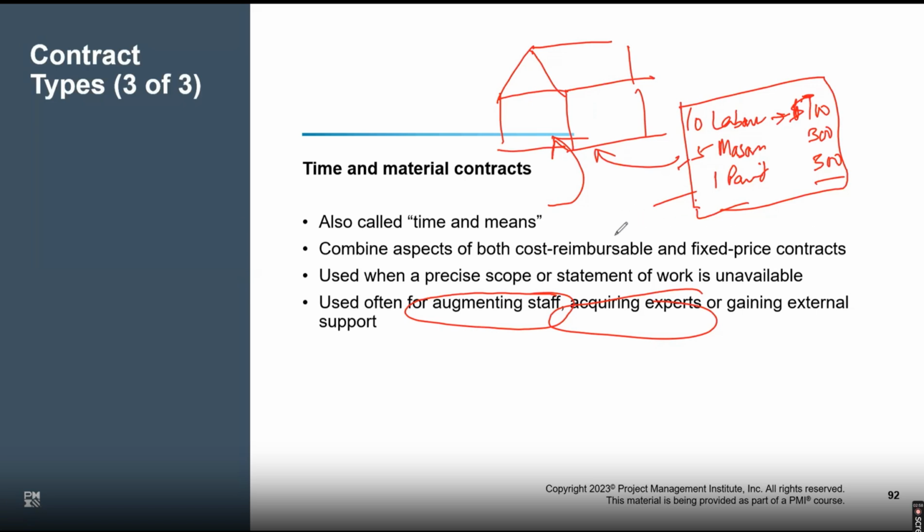Well, yes, these are time and material charges. This is what we use for our staff augmentation. Wherever we talk about outsourcing, it's pay as you go. So here it's more the traditional way. Basically, I'm going to provide you resources, and I'll bill you for the resources. I have a rate card. So in construction, I have a rate card, you tell me how many people you need, and I will give you those people. The contract is going to happen between me and you.